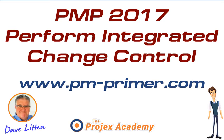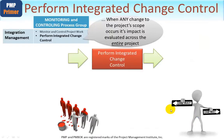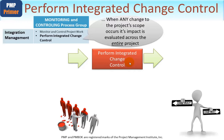Let's now look at the next process: Perform Integrated Change Control. The most important thing to remember here, and the reason why this is within the integration management knowledge area under monitoring and controlling, is because when any change to the project scope occurs, its impact is evaluated across the entire project. Perform Integrated Change Control is focused on any changes to the project scope, whereas the previous process, Monitor and Control Project Work, focuses on managing the way that the scope is actually executed.